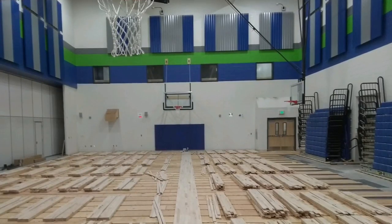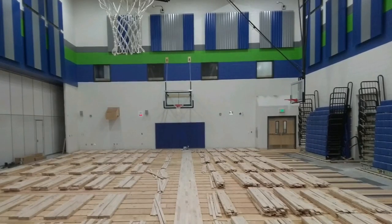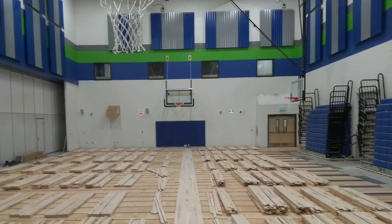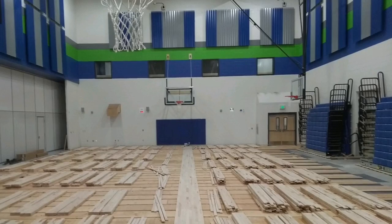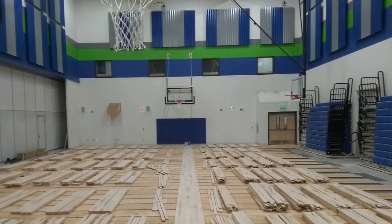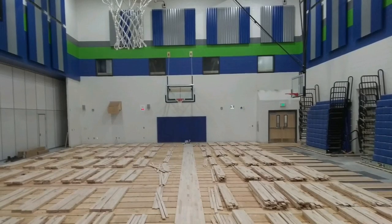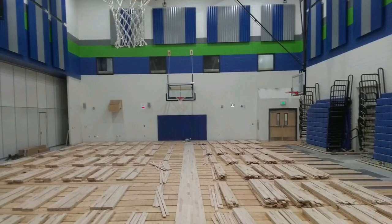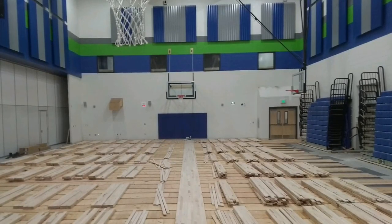We will then remove the water-damaged floor next to the bleacher wall, install the VersaShield, vapor barrier, subfloor, and maple. We will then sand the maple next to the bleacher wall. Tentatively, we should be ready for the bleachers to be reattached to the wall on Friday, September 14th, 2018. We will work through the weekends to accomplish this job as quickly as possible. Thank you again for choosing Wyoming Wood Floors.